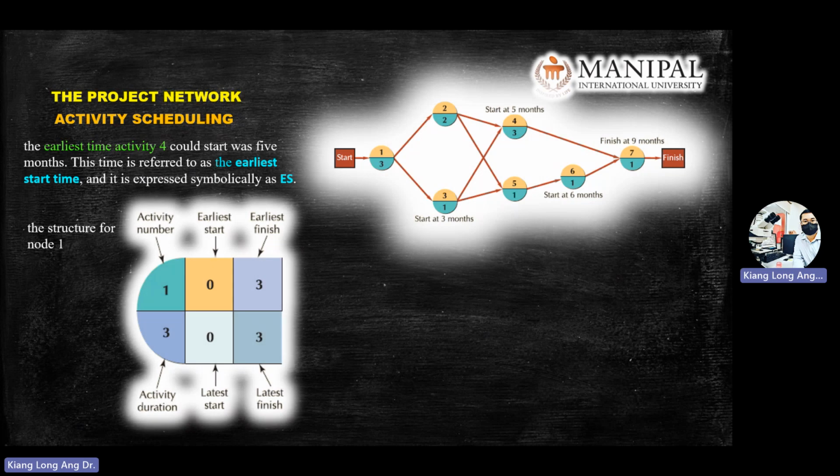So we will start to build this matrix. Normally when you come to your final or test 2, you don't need to draw the circle, you can just draw six boxes. So this is the activity, and this is the time, which you can extract from the description or from the table. They will give you the activity, the time needed, and then the precedence relationship.